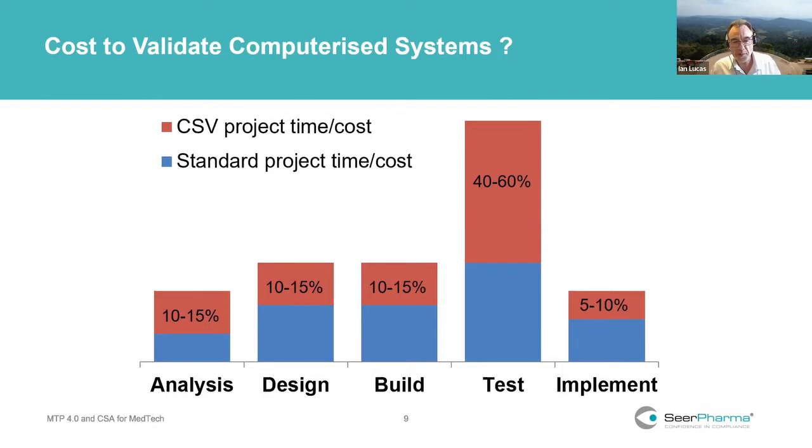What's that telling us? It's telling us we're trying to build quality in by testing it. You can't do that. That mug that Tim's put up there is actually quite a good tongue-in-cheek thing: let's do more coding, more testing, and try and find the bugs. Whereas if we took a step back and designed things up front in a better way and did a bit more analysis and spent our time there, we could actually spend less time because we'd have fewer bugs to fix in the first place. So this is a very good slide to say that we've skewed our thinking towards testing quality in, which is the wrong way of doing things.